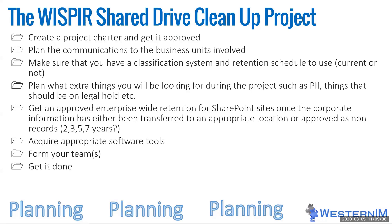Make sure you have a classification system and a retention schedule in hand, whether completely current or not — those often haven't been updated for quite a few years, but at least you have one. Plan out what extra things your team is going to look for during the project, since we're going to be looking at SharePoint sites and cloud locations with subject matter experts anyway, so we should have a plan in mind for new things we might want to know.